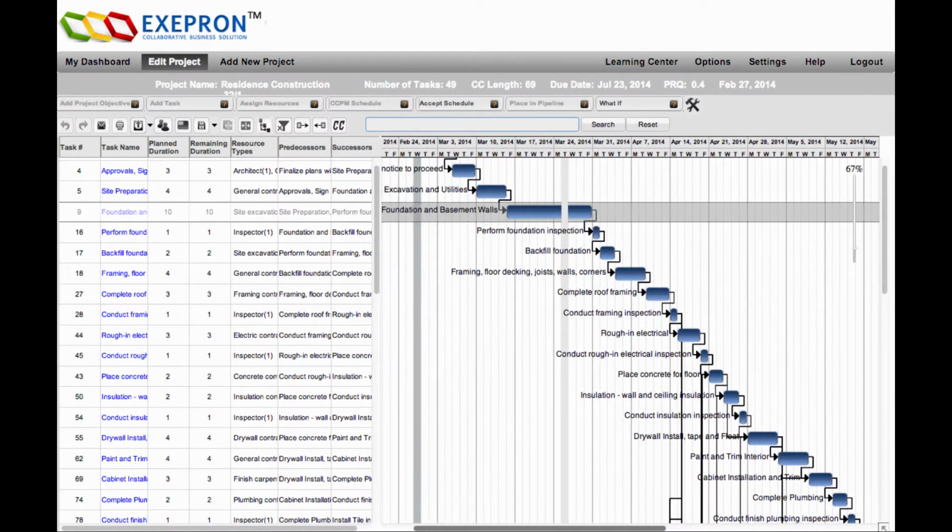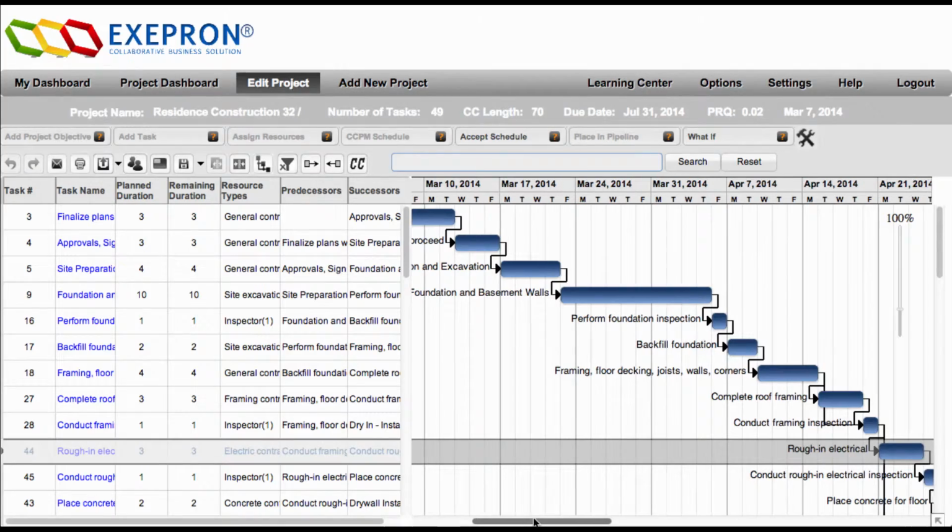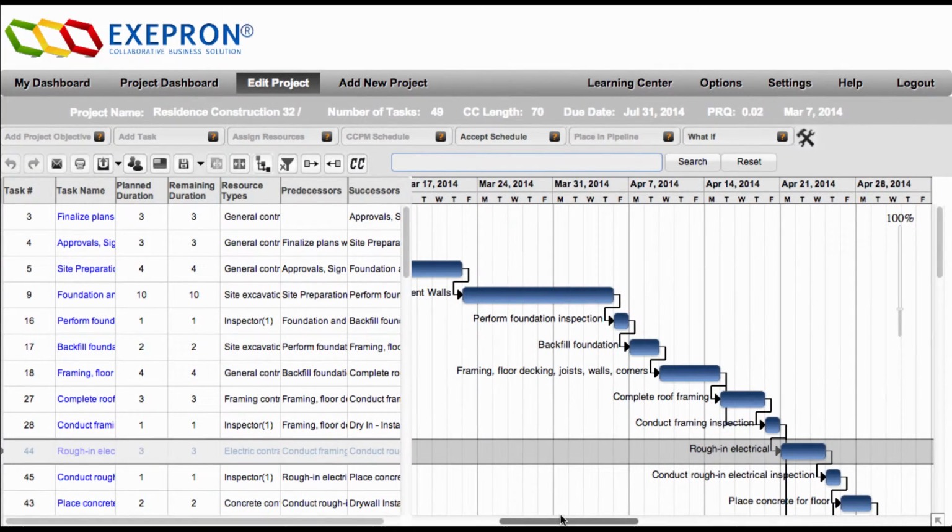Repeat this process until a project schedule with an acceptable risk is achieved within the scheduled due date. Note: scheduling a project with an aggressive project due date with a partially penetrated project buffer will increase the execution risk for this project.